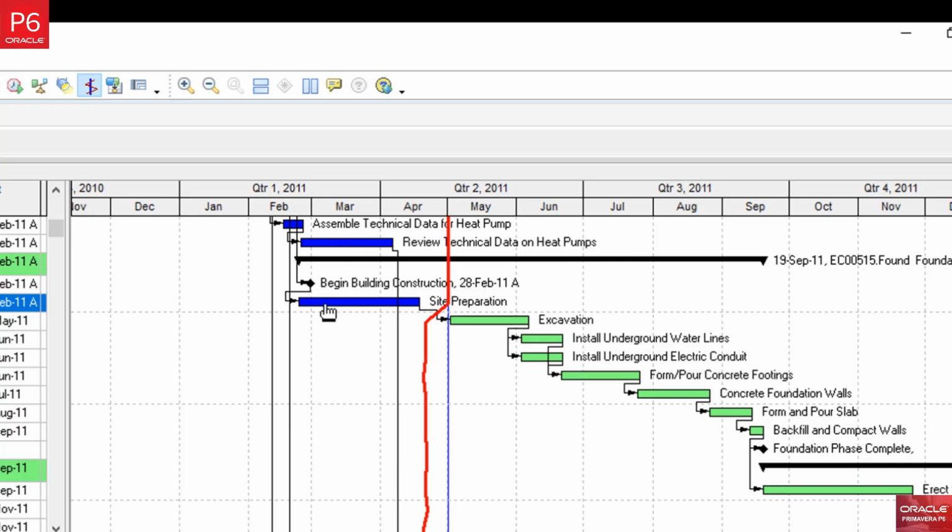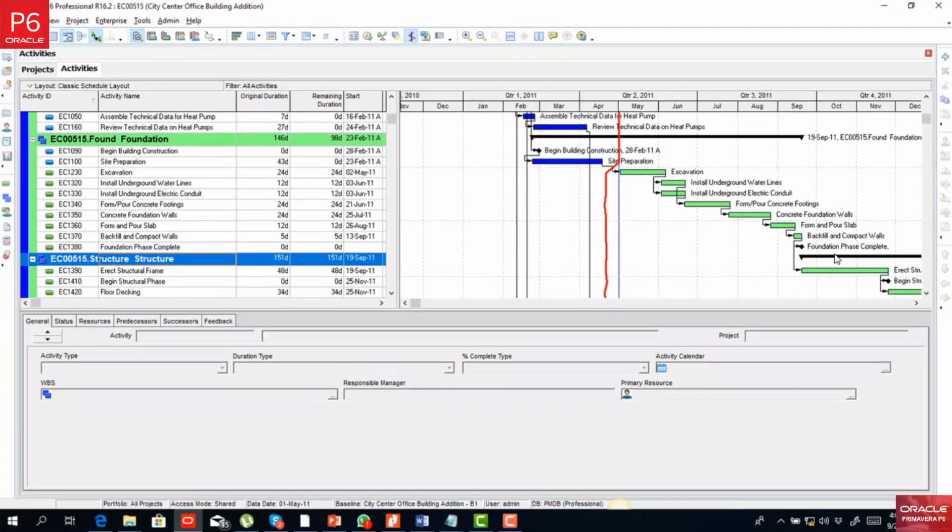And like I told you, I did some tweaking to illustrate this. We're going to learn how to complete our activities much more later. The ones that are still green represent activities that are yet to start. And these bars that are dark, or rather black in color, and look way slimmer, represent your WBS elements, in other words, your summary tasks. And that's essentially what you're seeing here.